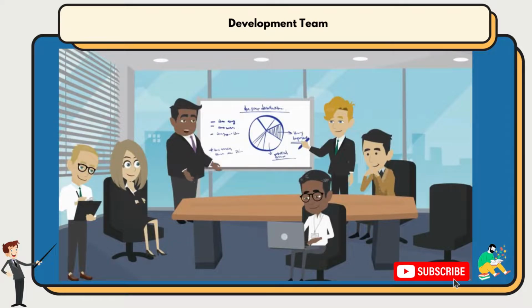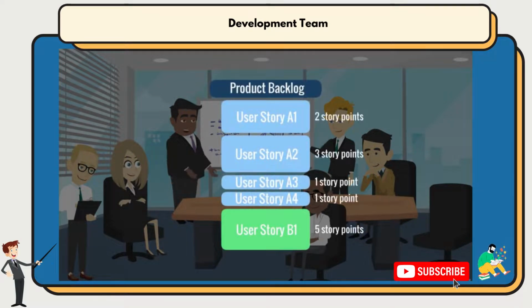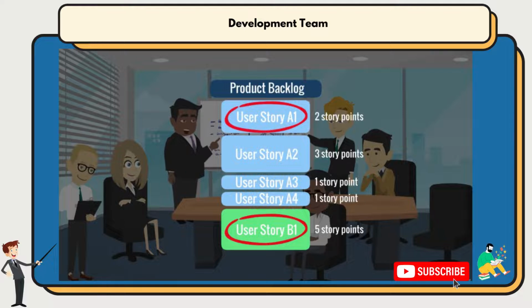The development team has the responsibility to assign story points to each user story in the backlog list. This gives important information to the product owner and the other project stakeholders, as the amount of effort may change the way they prioritize the work. If 2 user stories are considered with a similar priority at the beginning, but when the story points are assigned it turns out they require a different amount of effort, it is likely that the product owner prefers to push the one requiring more story points for later in the project. This would leave more room for the development team to complete more stories early on.